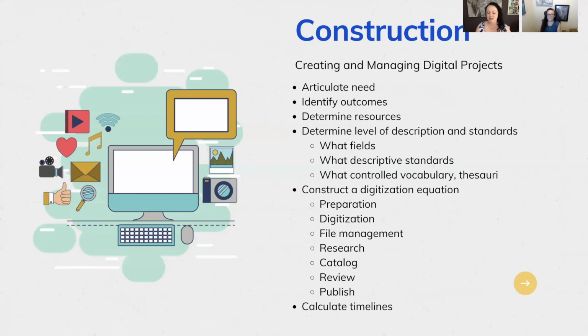Then, of course, you're going to need to think about file management, the research you need to do to learn about that object so that you can then catalog and write that descriptive data, and then the reviewing and the publishing to whatever platform you use. So with all of that in mind, calculating the time it will take you, your staff, working with a vendor, and bringing out that whole timeline from starting to ending.